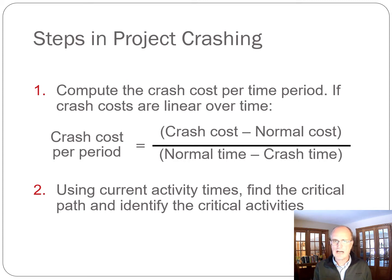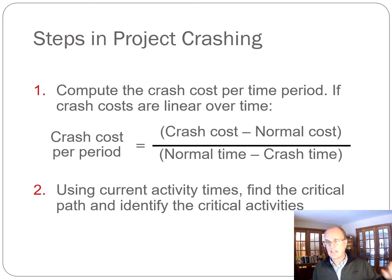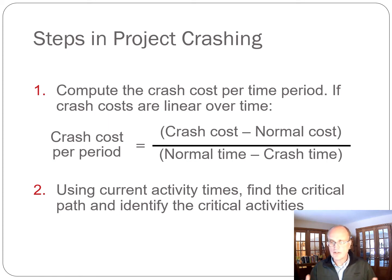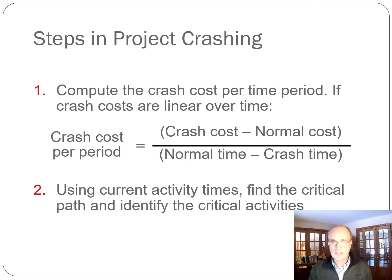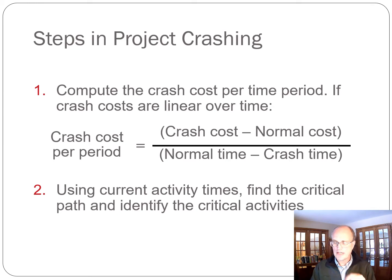The cost with the shorter timeline versus the normal cost over the crash time gives you a crash cost per period. You usually want to crash one unit of time at a time — that's a mistake students often make — because another path can become critical. There are also examples where the first day costs X and the second period costs X plus 10%, so as long as you know what each incremental period of shortening costs, you can make the crashing decisions. I'll give you the crash cost per unit of time in the subsequent example.